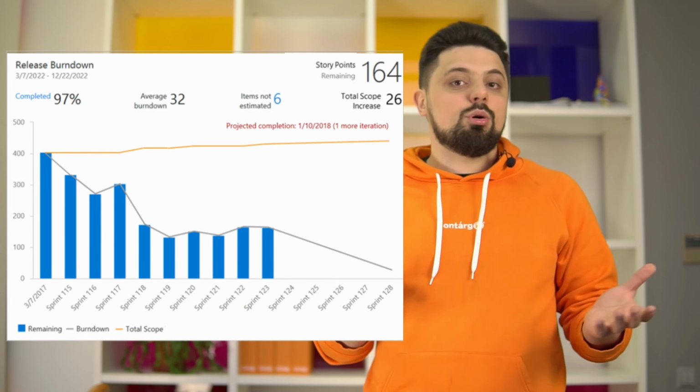It's a common practice to have the sprints up to 1 to 2 months long, with the daily stand-ups to synchronize the team and visualize the progress with some sort of burn-down diagram. Make sure that the joint team responsible for the delivery have enough authority. The more autonomous the team in making decisions, the faster the delivery. Try to make as much as possible from this basic agile practice.